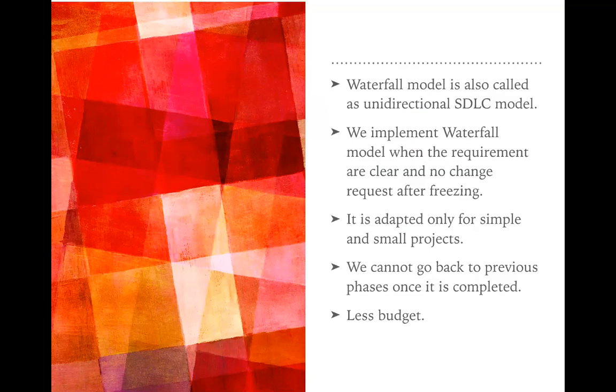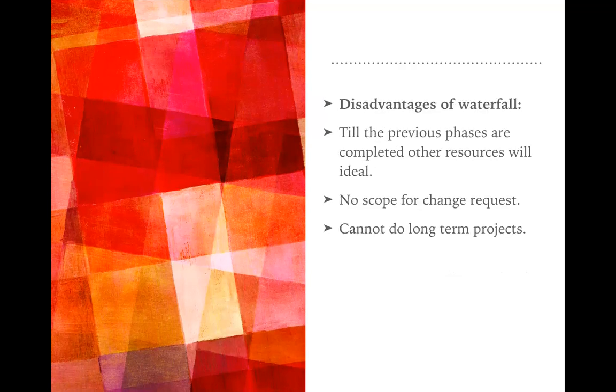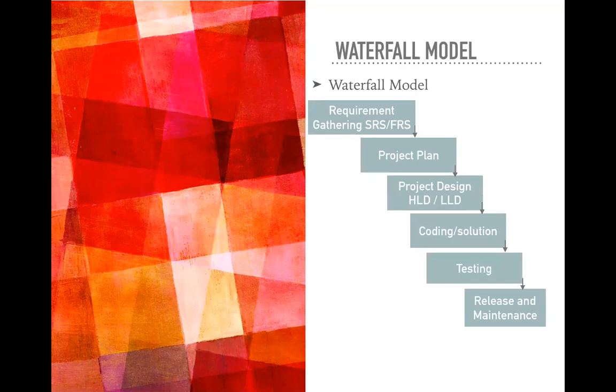It is not an expensive SDLC model. It can be built at a lesser cost. Disadvantage of the waterfall model: till the previous phases are completed, other resources will sit idle. So this is very, very important. Let's go back to this.